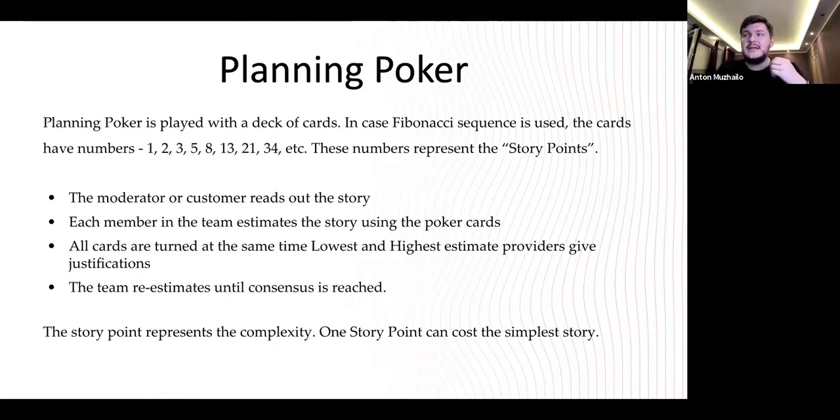Right, for lasagna, it requires more components. Okay, harder from this point. And these components must be placed layer by layer, etc. So there is some complexity here. So I would say, for example, 5 story points for lasagna and 1 story point for chicken egg. So see, it's much easier to compare the complexities of 2 different things.